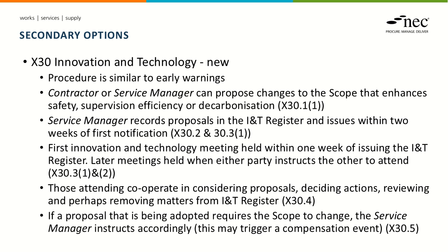But assuming we want to go ahead with the change and everybody's minded to do this, the discussions within the meetings, much like discussions within an early warning meeting, are recorded in the register, in this case the INT register. So the INT register is our management tool for recording what the issue is, whether we're going to do something about it, and who's going to do what going forwards in terms of managing the issue. If the proposal is going to be adopted and requires a change to the scope, then the service manager will need to instruct that change. And depending on the circumstances, this would lead to a compensation event.